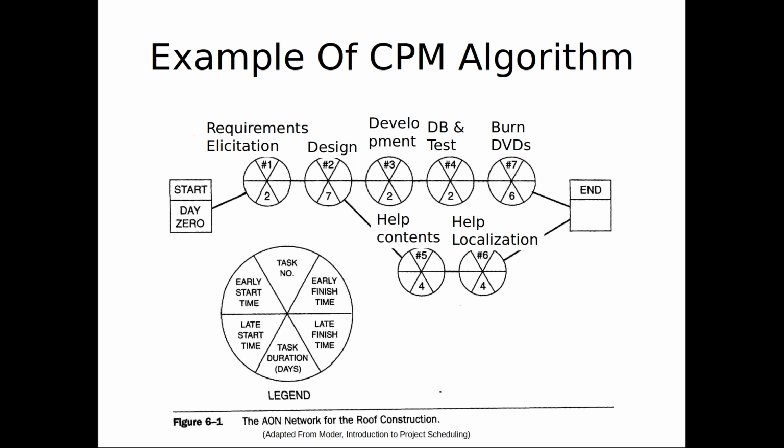So that, ladies and gentlemen, is the critical path. This is a non-critical path. And what we had to do here, you'll notice, we ended up taking the minimum of 9 and 11. Why minimum? Because we're considering the latest we could finish this thing without delaying the whole project, right? And if there's even one successor of ours, one thing that this goes to, which has to finish earlier, this node has to finish earlier. Do you understand that point?